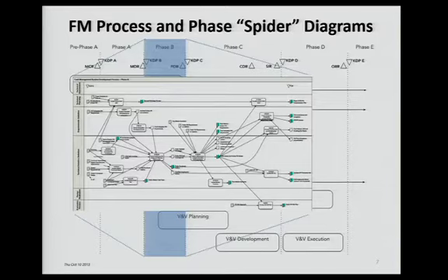The main boxes on this are tasks that need to be performed during a particular phase. And you can see, if you remember flowcharts, the document sign. The documents coming in, there are products coming in that are needed to perform that task, and products that are outputs for those tasks. So every task has inputs and outputs, and some of the documents are color-coded as required for a particular gate product. This one's due at PDR or CDR or whatever. And then the relationships between those tasks.